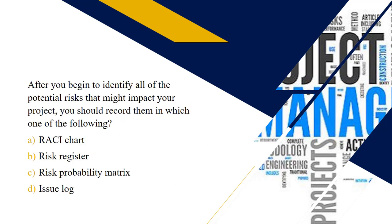After you begin to identify all of the potential risks that might impact your project, you should record them in which one of the following? That's right — it is the risk register. This is the tool that you're going to use to document all potential risks for future analysis and evaluation, so definitely know about the risk register.